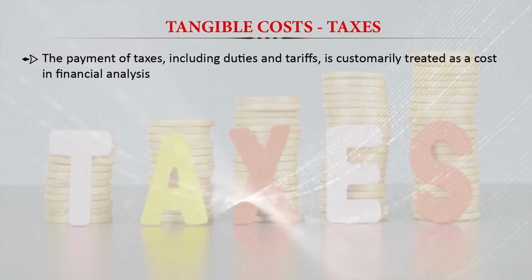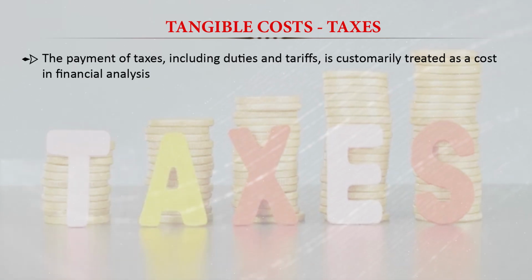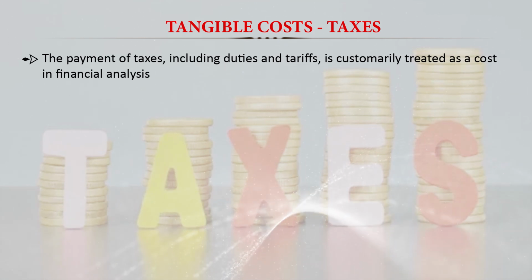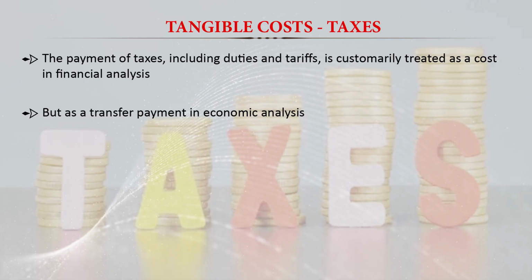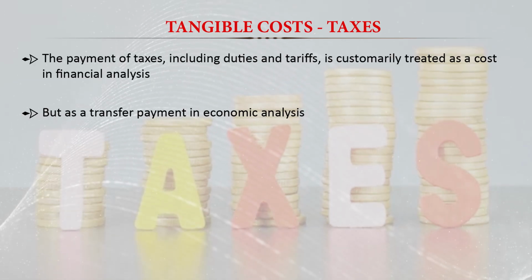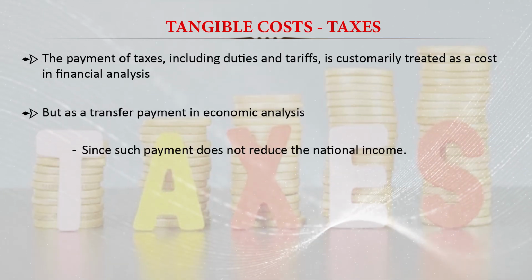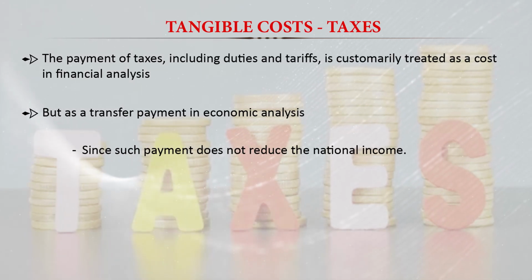We can easily identify and easily measure the taxes and the payment of taxes, basically including the duties and tariffs also. It is customary to treat the tariff and the duties or tax as cost in the financial analysis. Actually they are not part of the economic analysis because they are simply a transfer payment in the economic analysis, since such payment does not reduce the national income. So that's why they are a transfer payment in the economic analysis,